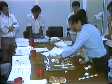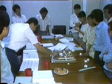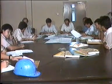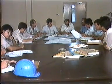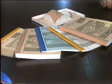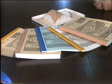To ensure that students do not have to work at great heights, a task force of academic staff, consulting engineers, and contractors brainstormed various methods and finally decided to build the roof at ground level and then raise it to a height of 3 meters by hydraulic jacks. The design, planning, and implementation are crystallized in these 5 volumes.